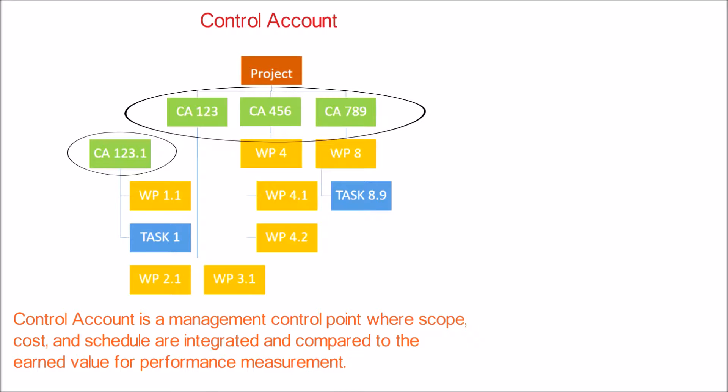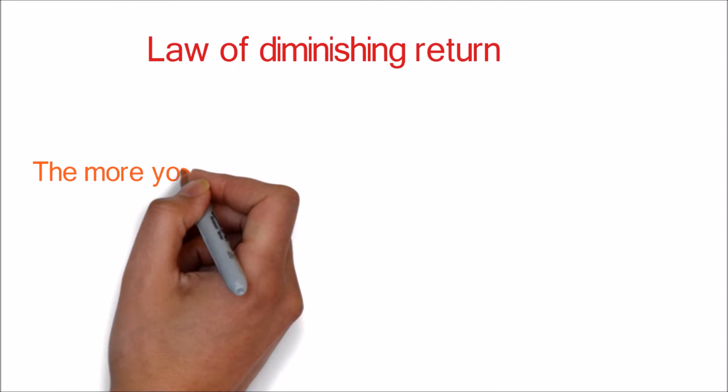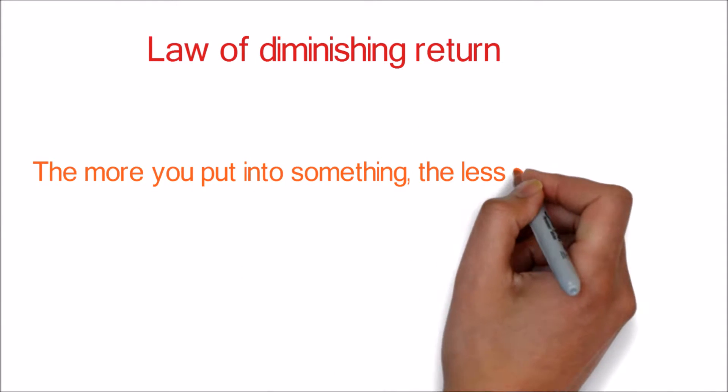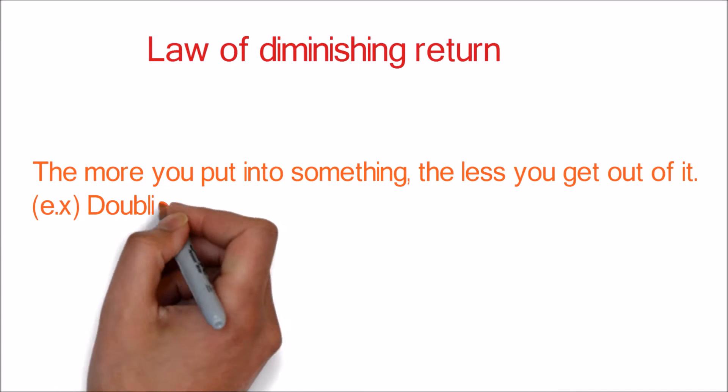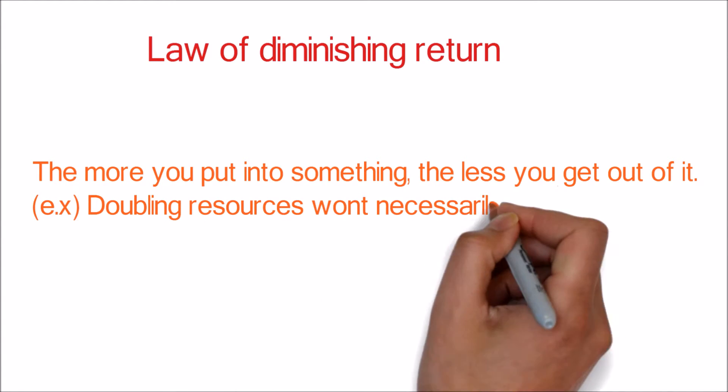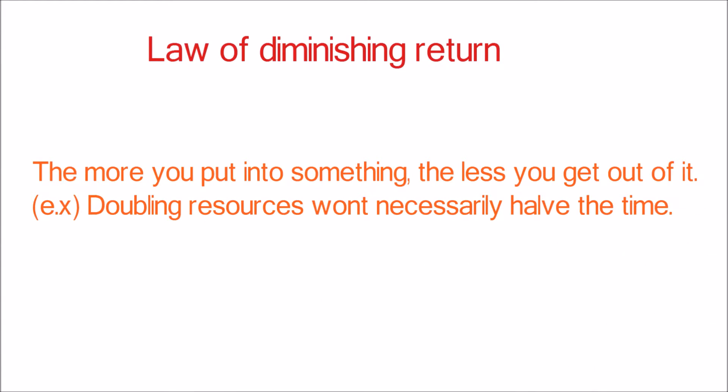Law of diminishing return: the more you put into something, the less you get out of it. For example, doubling resources doesn't necessarily halve the time.